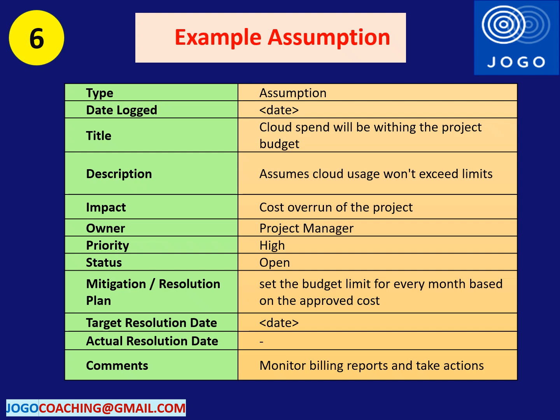The assumption is assigned to the project manager. Monthly spend limit is set for the team, and the monthly billing will be monitored by the project manager as a mitigation action. This way, the assumption will be controlled without leading to an issue or the cost overrun.